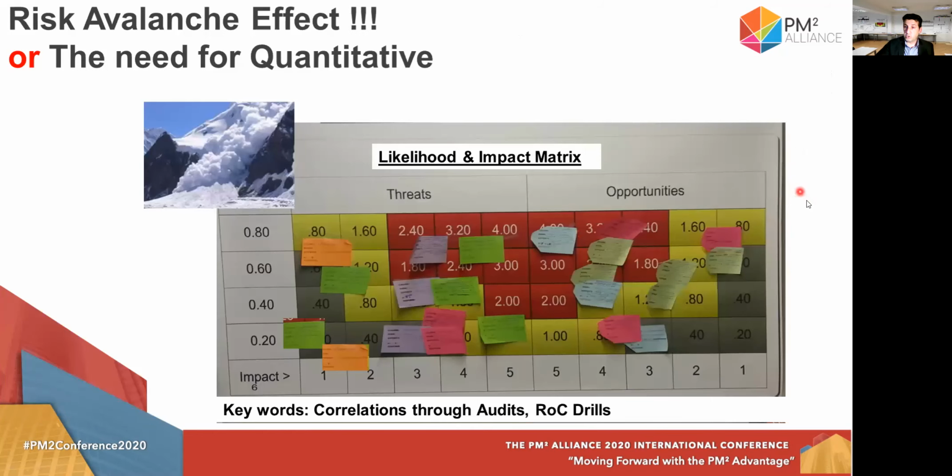The next step, in projects that are complicated, very serious for your company, or of high visibility, is that you might also need to do quantitative risk analysis with specific quantitative analysis programs. Why? Because you want to be able to say to your client or to the AGB in how much time you will finish the project, or what is the percentage that the budget they have asked will be achieved.